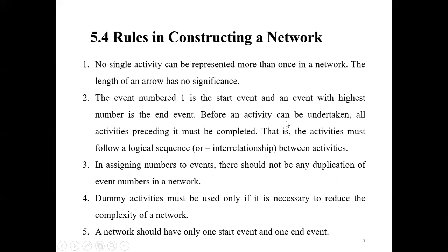Before an activity can be undertaken, all activities preceding it must be completed. So when you start the B activity, A should be completed first. Sometimes many activities can be started in parallel, as we discussed earlier. Even then, before you start another activity, the immediate predecessor activities should be completed. Activities must follow a logical sequence, the interrelationship between activities.